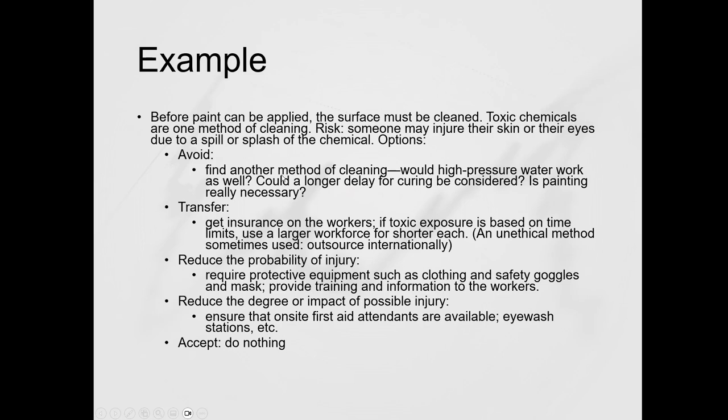If there are occupants in the building and you're still doing construction on it, when you're going to be painting, those fumes can get in the ventilation system and it will likely cause them harm. One of the ways to avoid painting during the day is you could do it at night, so that when people go home, you paint, and that way the fumes in the ventilation system clear out by the morning. The second option might be transferring, right?